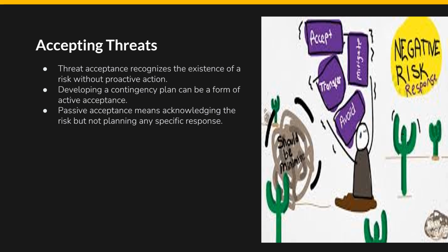Weather-dependent outdoor event. Imagine a project involving organizing an outdoor music festival. The project team identifies the risk of adverse weather conditions. While they recognize that bad weather could impact attendance and the overall success of the event, they decide to accept this risk. They might have considered the unpredictable nature of weather and the limitations of available resources to mitigate weather-related risks. In this case, the project team might have a contingency plan in place, such as providing rain covers for the stage and seating areas, but they don't invest significant resources in trying to change the weather.